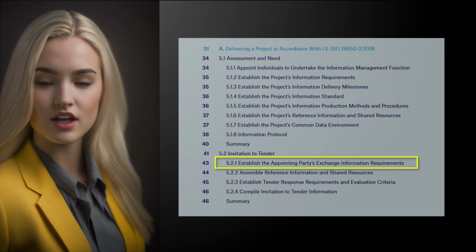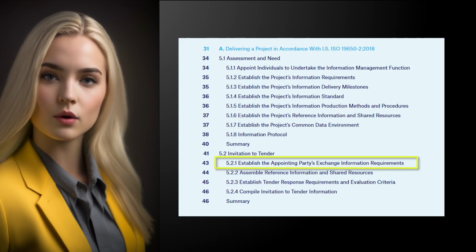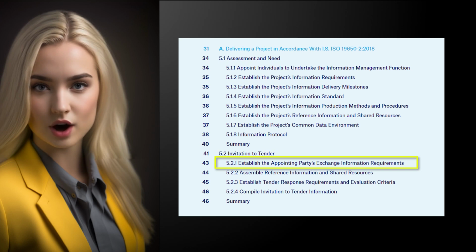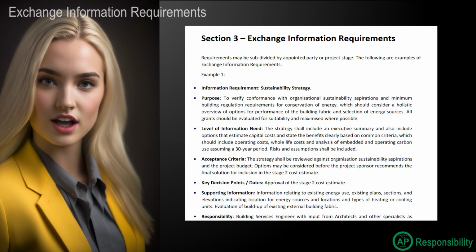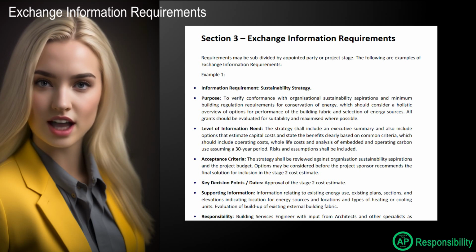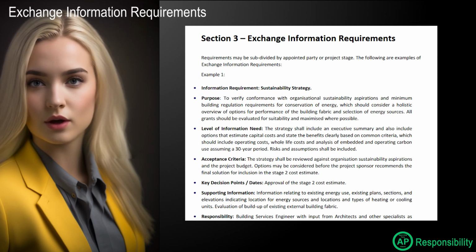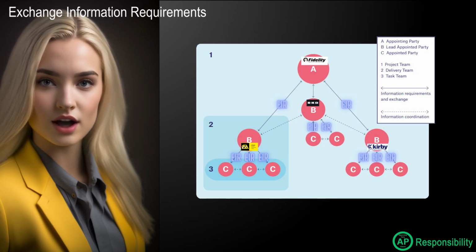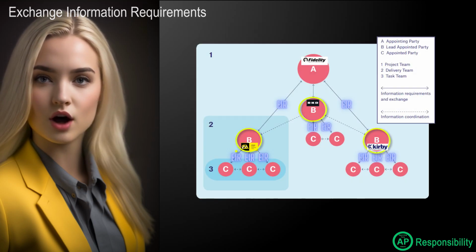The steps to invitation to tender are as follows. Step 1. Establish the appointing party's EIR, Exchange Information Requirements. The appointing party or client shall establish the EIR for each prospective lead-appointed party, e.g. MAC Group. Construction projects may also include more than one lead-appointed party.